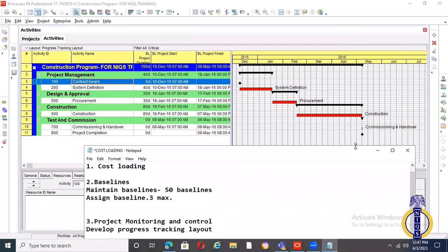So after developing your schedule, print out your critical path and paste it maybe in your war room, your project meeting room. This is your critical path. Maybe you can have a level 1, a high level, put it there, very bold for everybody to see. The key decision makers should have that. You can call a meeting to educate your team on what it means to the project if your project manager does not know how to use a schedule.